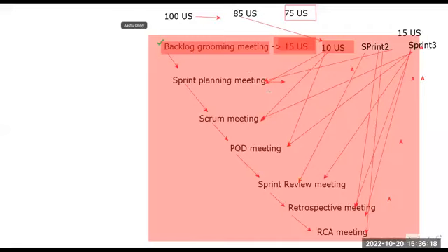Nothing like that. Our management, client, BA, and project managers will analyze how many stories we can actually complete in 2 weeks. Accordingly, we select some user stories. See, here I have selected 15. Next, I have selected 10. It varies, right? Depending on the complexity, we select the related user stories which we can complete in 2 weeks.